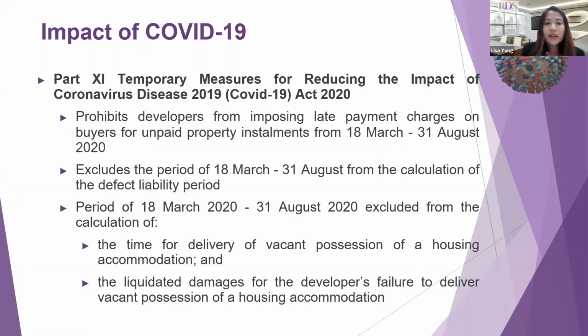The COVID-19 Act 2020 is gazetted and came into effect on the 23rd of October 2020, has modified several provisions in the HDA in 1966. Firstly, it prohibits the developers from imposing late payment charges on buyers for unpaid property installments from the day MCO started, i.e. the 18th of March to 31st of August 2020.